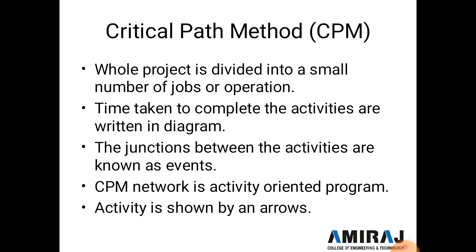So it's a totally dependent activity, and all the jobs and operations are dependent on each other, and some of the activities are independent of other activities, like electric fitting and plumbing. Both are different, clear? So both activities are not dependent on each other. Both activities start in parallel, meaning both start at the same time.